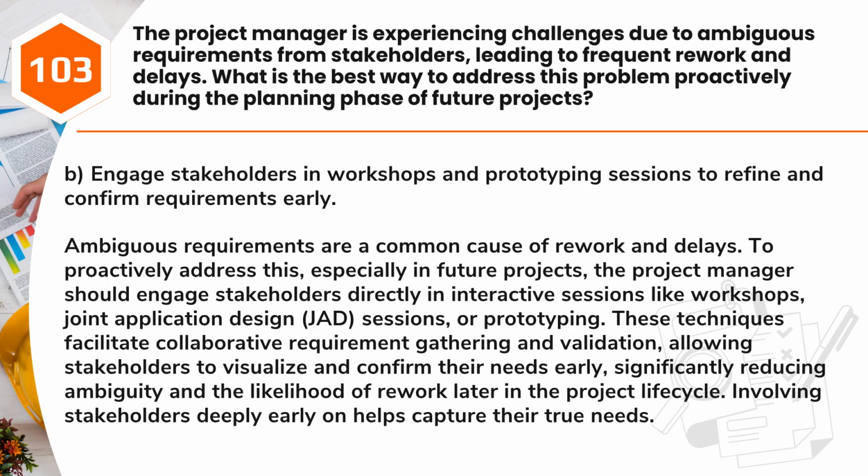Answer: B. Engage stakeholders in workshops and prototyping sessions to refine and confirm requirements early. Ambiguous requirements are a common cause of rework and delays. To proactively address this, especially in future projects, the project manager should engage stakeholders directly in interactive sessions like workshops, joint application design, JAD, sessions, or prototyping. These techniques facilitate collaborative requirement gathering and validation, allowing stakeholders to visualize and confirm their needs early, significantly reducing ambiguity and the likelihood of rework later in the project lifecycle. Involving stakeholders deeply early on helps capture their true needs.